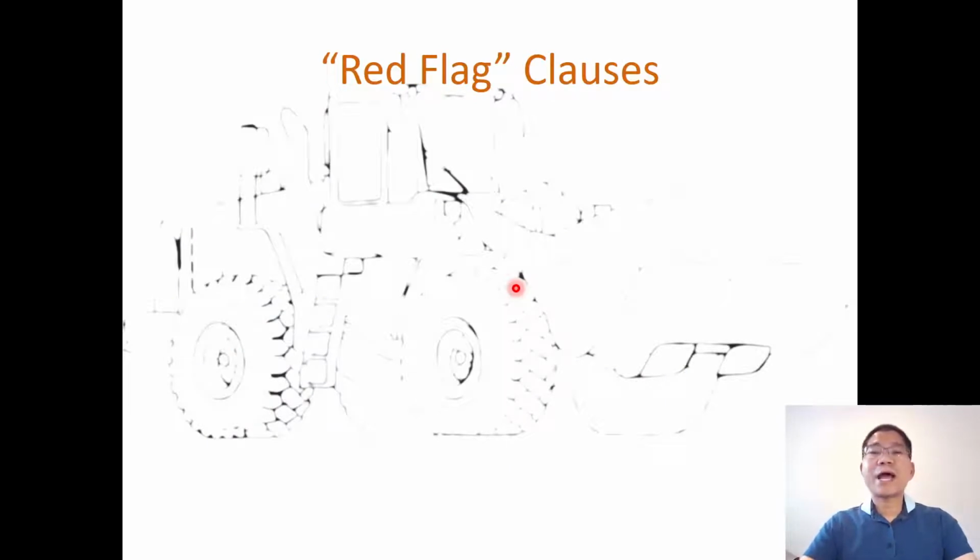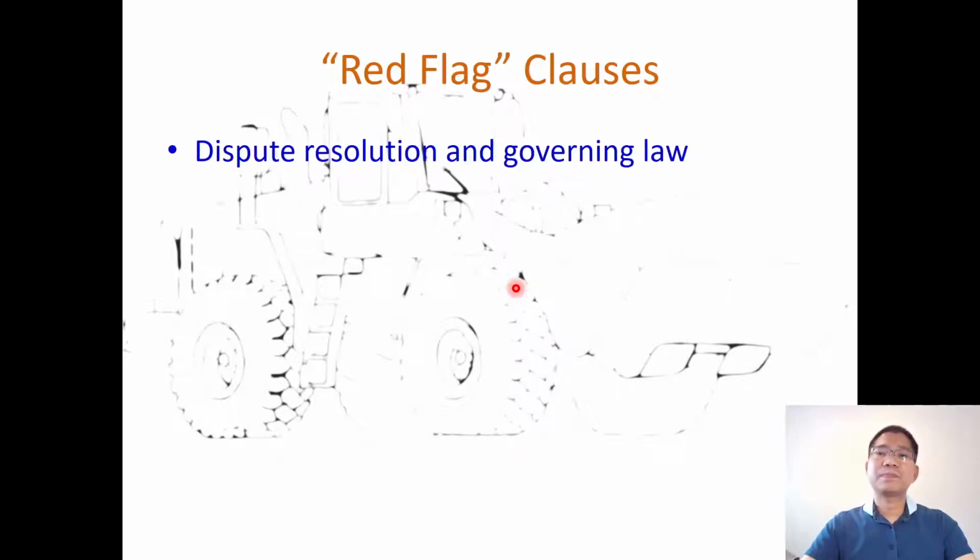Now let's talk about the red flag clauses that we need to consider carefully when we sign or review the contract. Dispute resolution and governing law, whether it happens in Florida or somewhere else where the project is built. What kind of resolution? What are the processes involved? Mediation, arbitration. Is arbitration final, I mean binding, or non-binding? Is there a venue for litigation, things like that? So be careful to read that one.